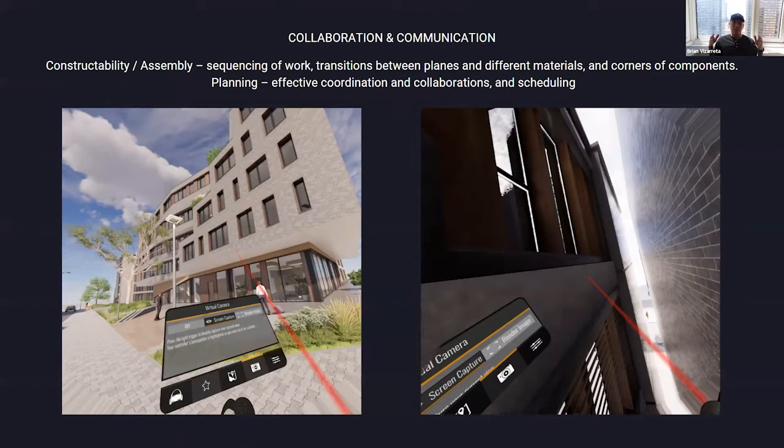When you actually have somebody in a virtual basket of a boom lift, 80 feet in the air, trying to put in a window or waterproof something or install a parapet detail, how does that actually feel when you're in a one-to-one perspective? And how do we start thinking about, maybe we have to change the detail so we can install this from the roof over a hanging as opposed to from below. Just something to start conversations, make sure everything's getting thought through.